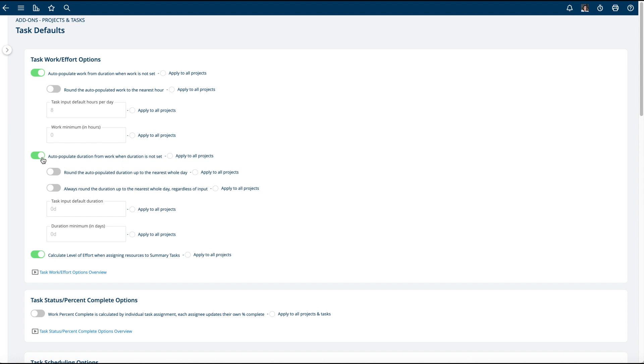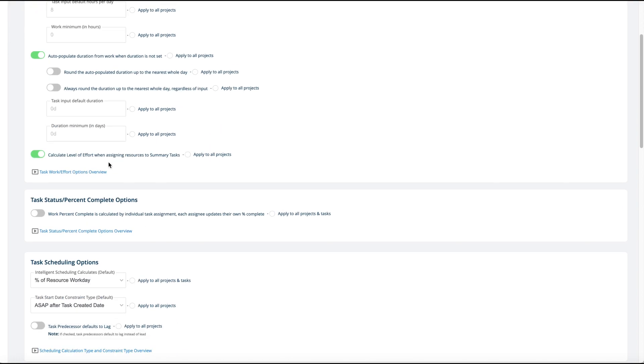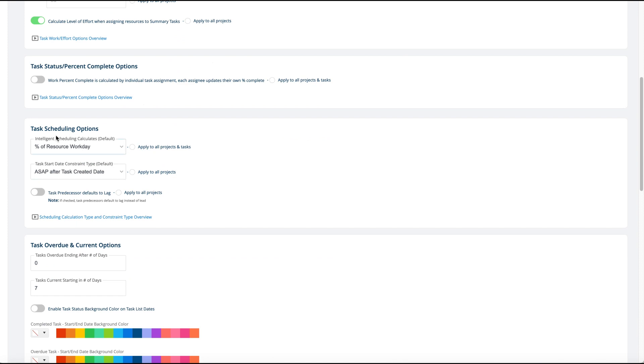Now these two are on by default. If you want to turn them off, it's really only for advanced project managers. Task scheduling options - I have a whole other video on what the default calculation type is. Normally when a task is created, you supply it the duration, five days eight hours, and we'll calculate that as 40 hours of someone's workday across the week.